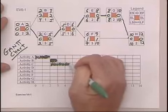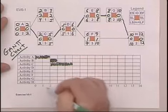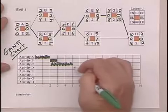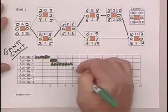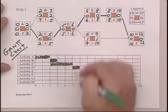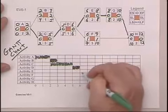Then D can start as soon as B and C is completed, which is the fifth day, and it takes one day. Then we can start both E and F. E takes two, F takes three.